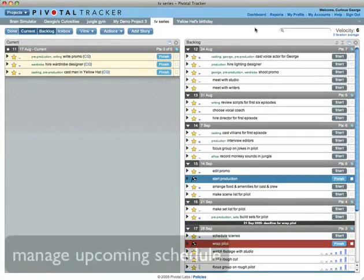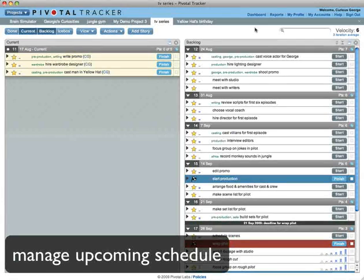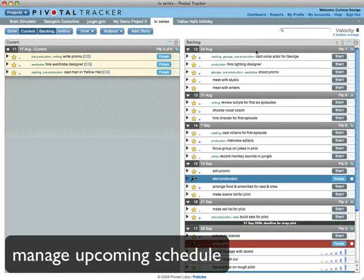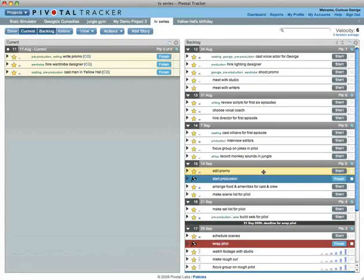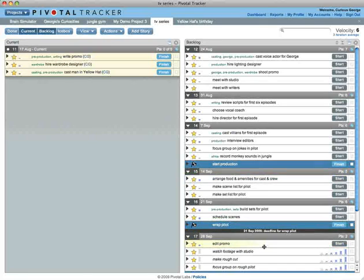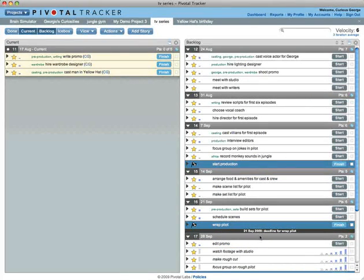If a release has a deadline and your velocity isn't high enough to hit it, the release will turn red. The deadline, if you choose to set one, is displayed at the bottom of the iteration in which it falls.